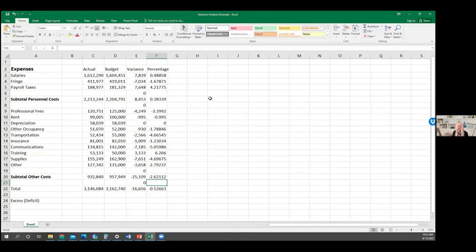But we really want to get at the pieces that are going tremendously over. And it doesn't seem like it's so much of a dollar amount, but it matters because you're spending a huge portion of that particular line item budgeted, and you're not going to have anything left for the next 3 quarters if you keep spending like that in that particular category, because we can't just move money from one to another typically, right? Because if we've lined out this budget, especially if our grant says specifically that's what we're spending these things on, we have to be careful.